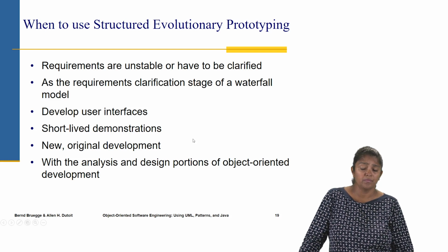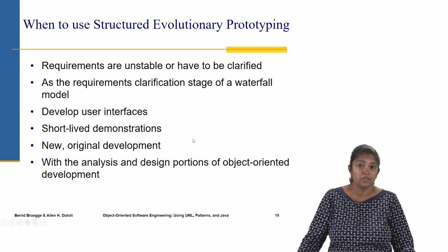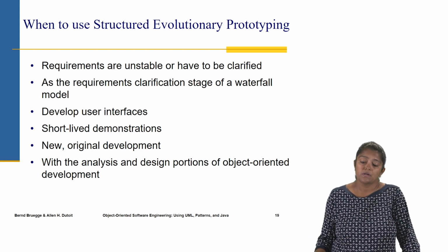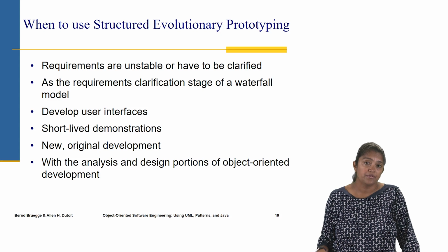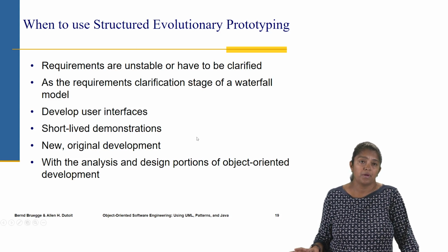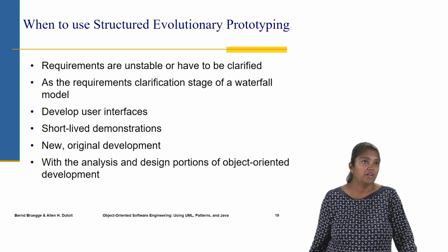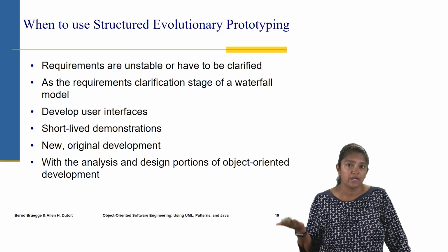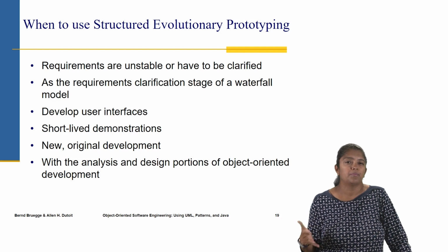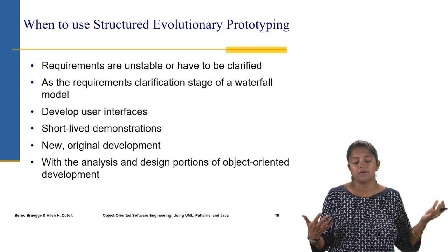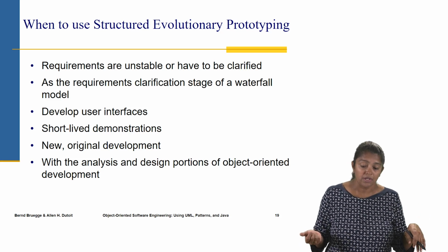It's a good model where there's a lot of user interfaces that need to be developed, and typically in that case it's a good idea to have feedback from the customer. It's also a good fit for short-lived demonstrations. So maybe a quick demonstration needs to be done for getting funding or some of those kinds of situations, and the product is not likely to be used for very long. It's just for a short-lived demonstration. Then it's a good fit.